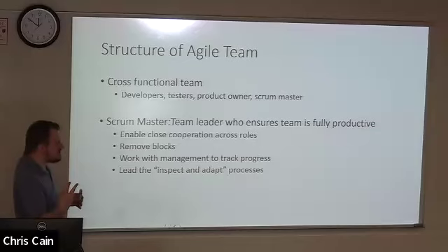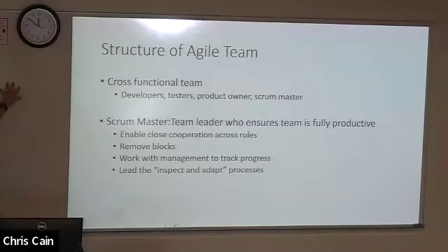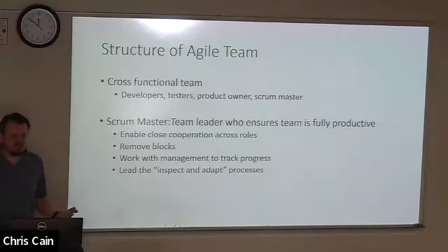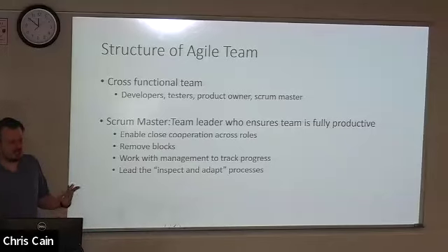You'll post 3 things. You'll post, what have I accomplished since the last meeting that we did? So between the last update that you got from me and right now, what is accomplished? The second piece, what am I working on today? Or what are my current tasks? What am I doing? And the third piece of information is, what is preventing me from making progress, if anything? So what am I blocked by?